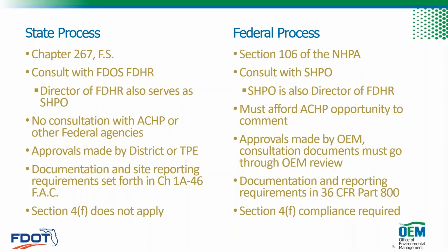So just a note that a project is federalized if it requires any federal approval or permit, or if it gets any federal funding. Now, even if the permit is granted for just a specific activity or location within a greater project area, the entire project has to comply with Section 106. And then another warning: federalizing a project means it has to comply with Section 4(f) of the US DOT Act.